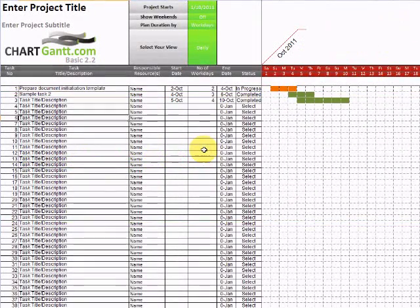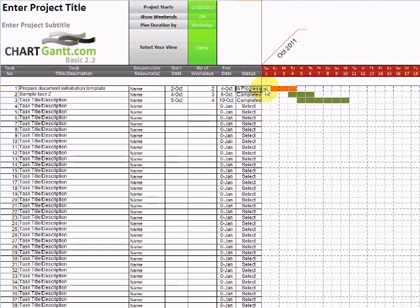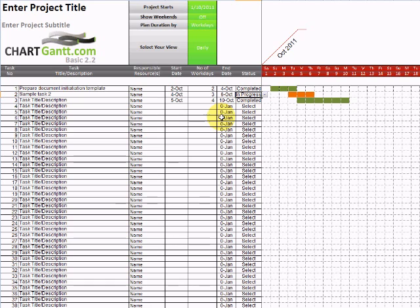5. Indicate status. We have a set of pre-built status indicators here. A standard bar is grey. An in-progress bar is an amber traffic light. And a completed task is green. And you can build up a portfolio of your tasks as you go through managing them.